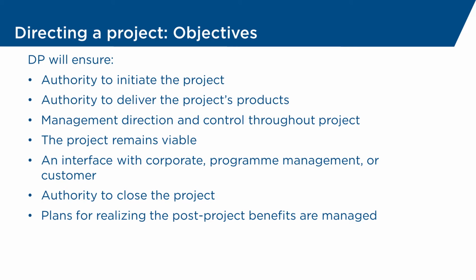They're also going to be an interface with corporate or any other key stakeholder that we need them to deal with, and often they'll be better placed to do that engagement rather than the project manager. We'll also need the project board to give authority to close the project. And in addition, we need to provide them with the means to go forward after the project to track the benefits. So we'll see that we're going to give them a benefits management approach.